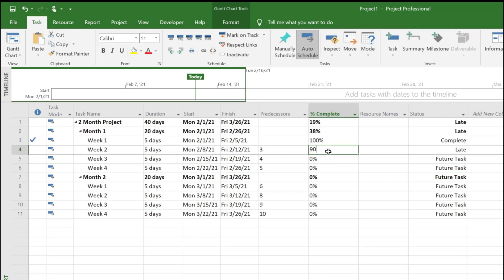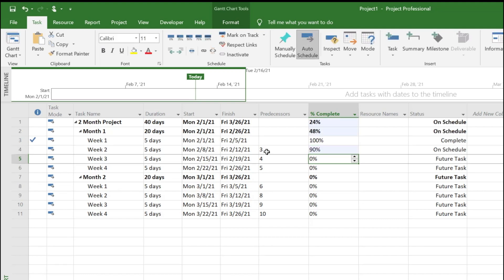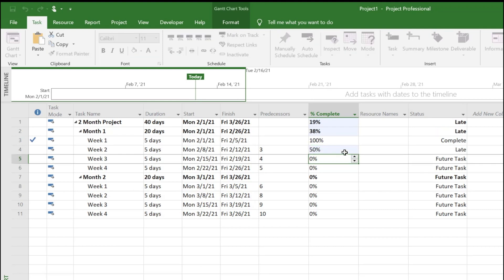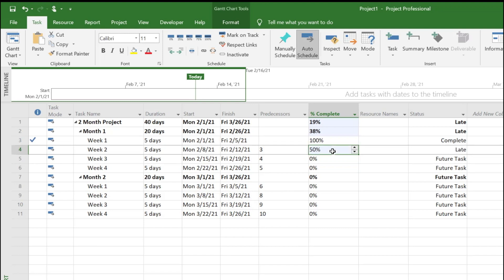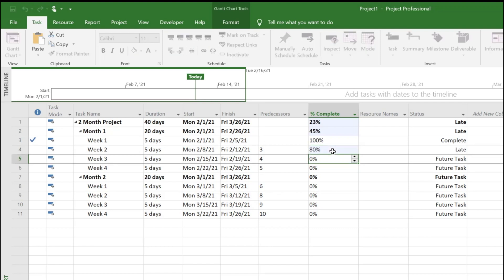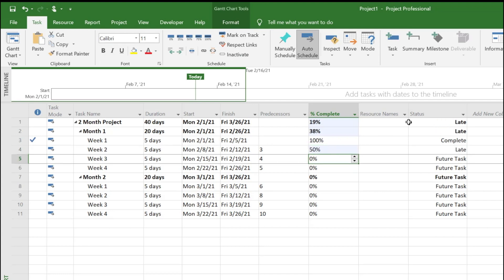If it's 90 percent, you can see the late will change to on schedule, which means it's not complete but it's on track. But if it's only 50 percent, it'll let you know it's late. It should have completed at least 80 percent to be back on track. That's what the status column is.